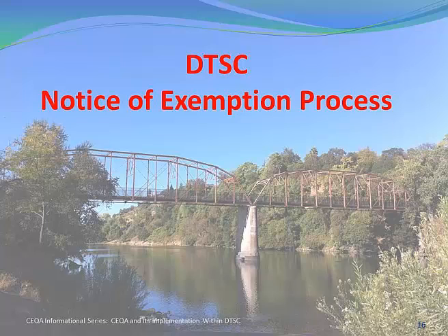Well, the PPS has to prepare all of the public notice documents. And that's why, as I pointed out earlier, when the public notice is prepared, the project manager needs to make sure that that public notice is coordinated with our office with regard to what it says about the CEQA process.